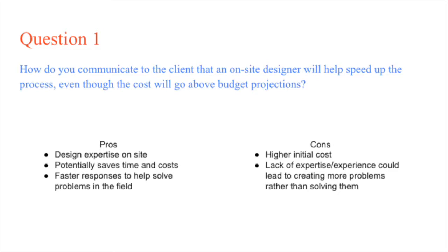A designer's expertise can help to provide timely answers and constructive solutions to issues that arise on site due to unforeseen construction issues. Requests for information, change orders, and other design information can be streamlined and problems can be fixed in person rather than waiting for the architect to visit the site. This will save both time and money throughout the duration of the project.